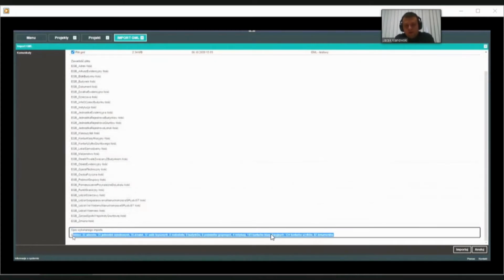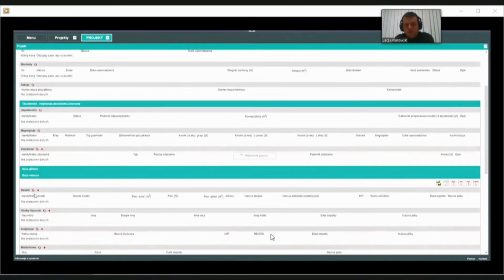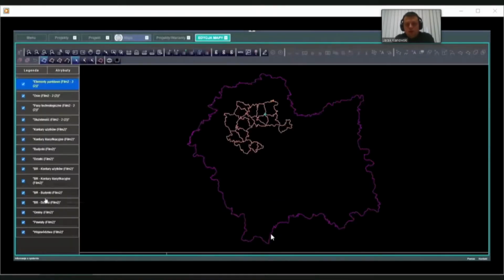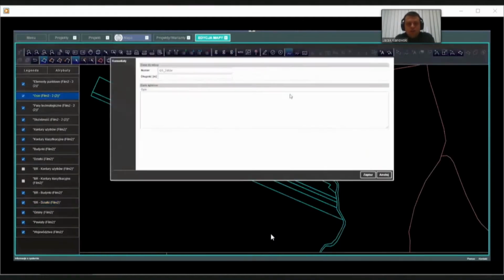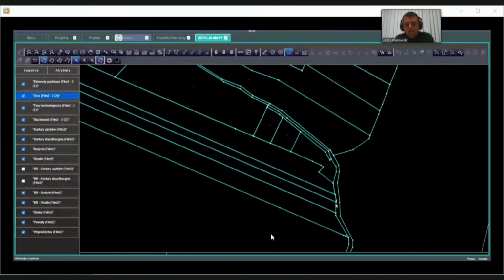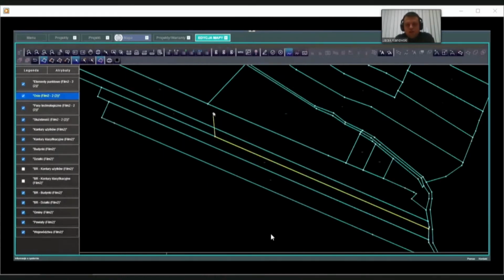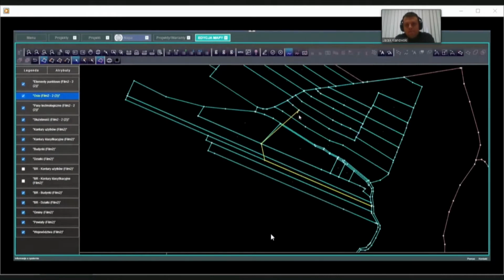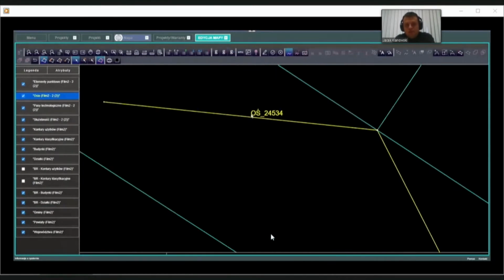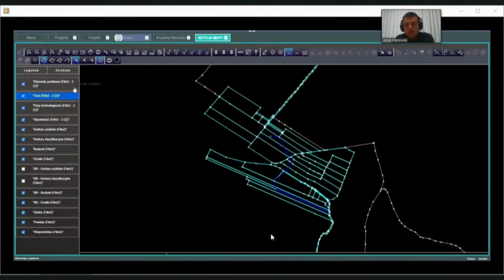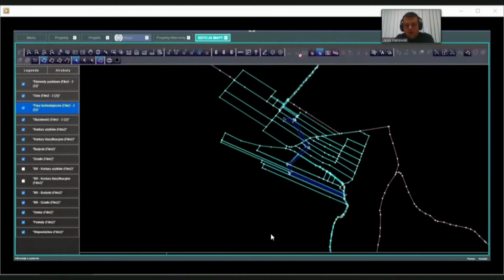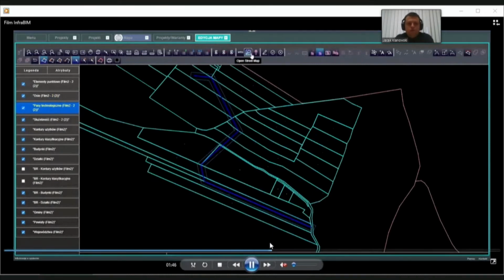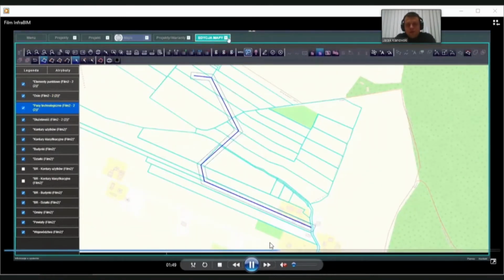On a database built like this, we work and we generate the whole history of the project by adding the basic map, design elements, and history of negotiations, and results of coordinations with other owners, owners of land plots along which the route is to be going, are introduced. We coordinate everything. Once we conclude the design process, the database is passed on to the real construction phase, and there further protocols are added going to the site. We can attach documentation from drones, orthophoto.